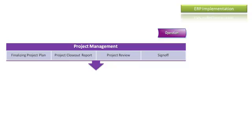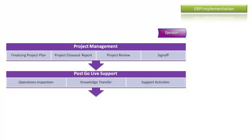The Operations phase begins once the project is done. This involves finalizing the project plan, checking if anything is missing, preparing the project closeout report, and getting sign-off. For post go-live support, operation inspections are performed, as some exception cases need to be handled, requiring a review of the design to verify it really works in real life.